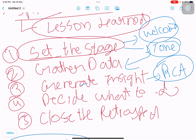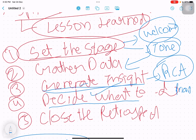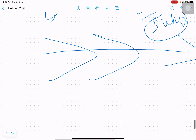In 'decide what to do,' we prioritize improvements. There might be 10 to 50 possible improvements, but we can't do all of them, so we choose one or two to implement in the next sprint. Finally, we close the retrospective by thanking everyone for attending.